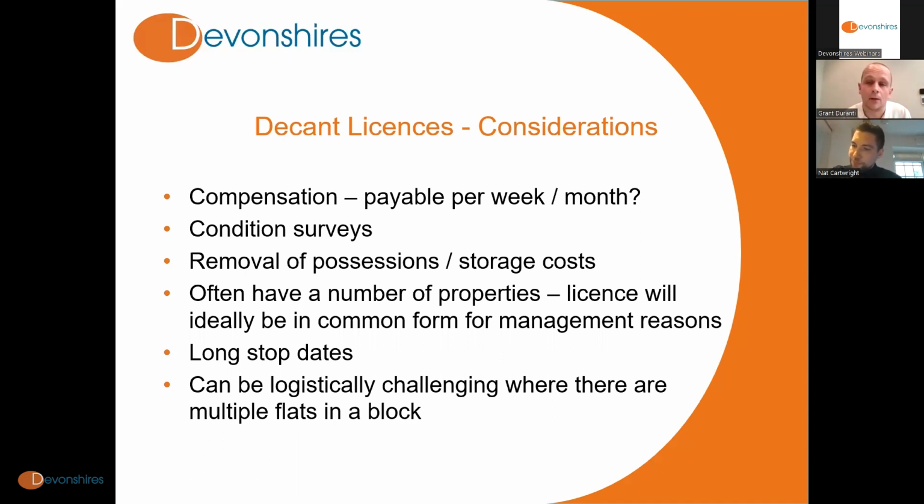Often, a license will say that before work of this nature can be carried out, a landlord and the occupier will carry out a condition survey, take photos, and document and agree them before the work is carried out, and that then sets the standard to which the landlord has to reinstate or replace, for example, any furniture which stays in the building, to an equivalent quality or standard to that which it was at the start.